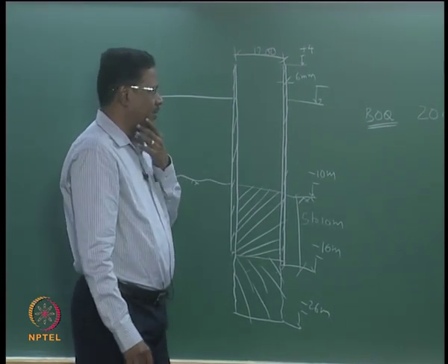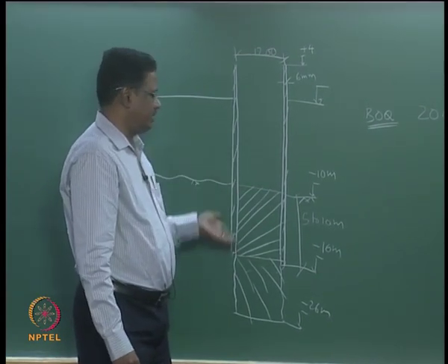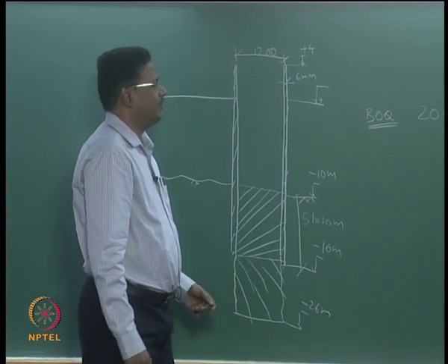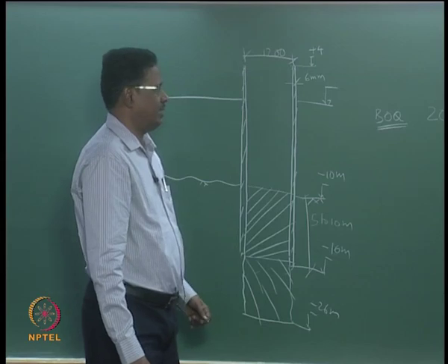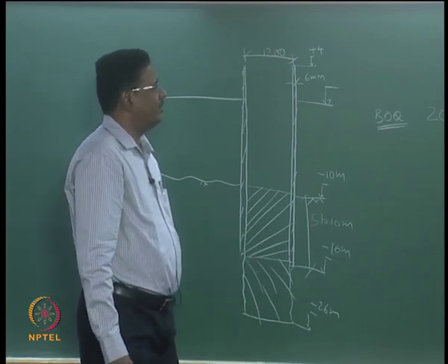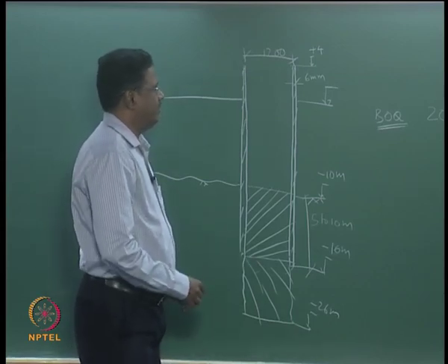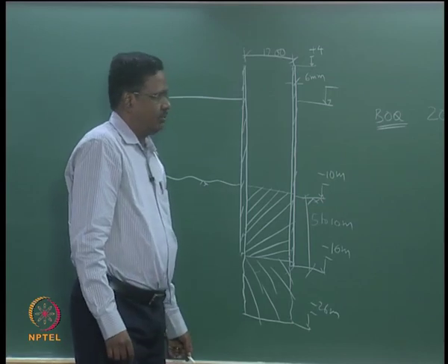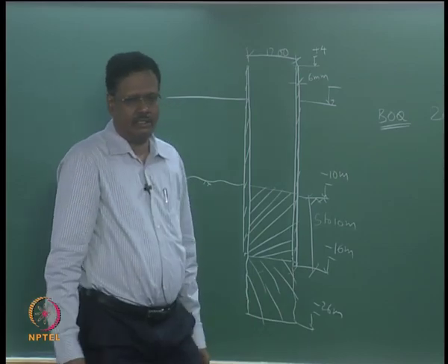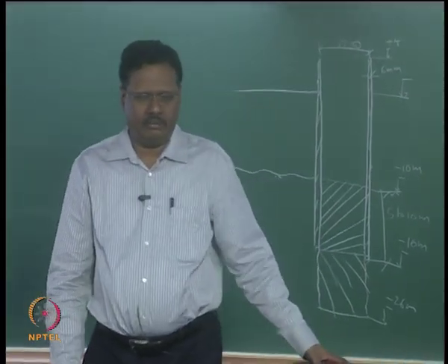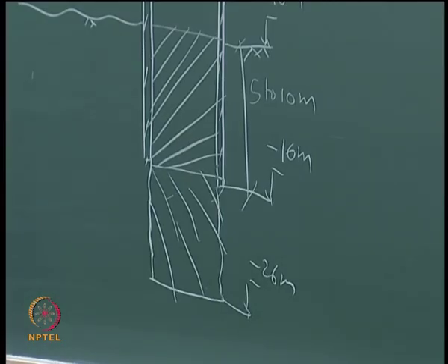in this particular project there is some rubble layer already existing because of some old construction, that is why we have given this item. Otherwise if it is a rock strata, it is 8100 rupees per running meter. This is how the cost has to be worked out. So bill of quantity is, this is 6 meter, this is 10 meter. If the rubble layer is not there, we will not include that layer. This is the boring cost for the pile.